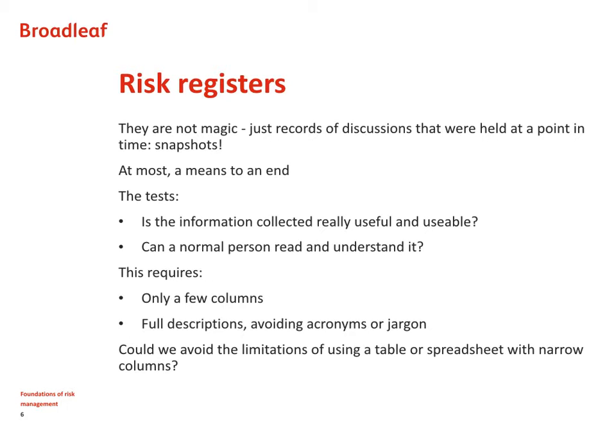While it might be attractive to use the spreadsheet for subsequent manipulation and sorting, there are some significant limitations in terms of storing data and information in a spreadsheet. It might be better that we actually just store material in a Word document and then transfer that into some database for further manipulation.